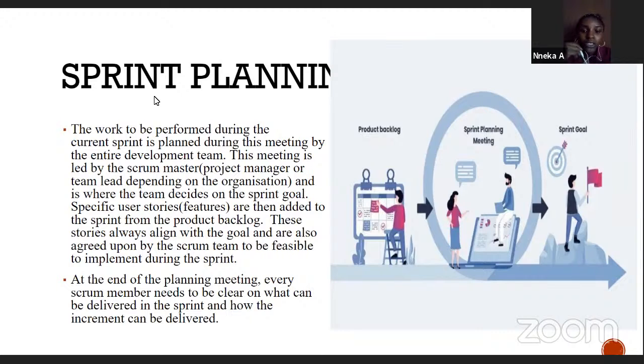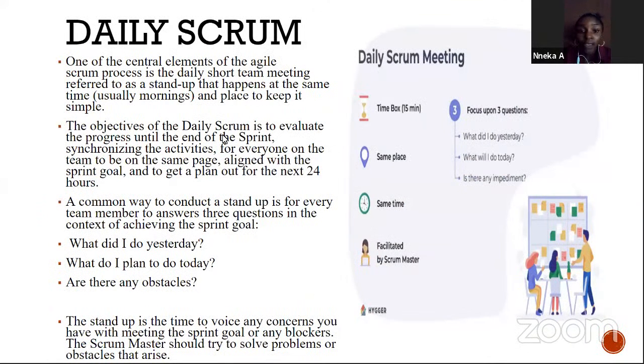Once the way we are going about this has been decided upon, it is put into the backlog in the form of user stories. I've talked about user stories in my previous presentation, but some people might not have been here. User stories are a way of explaining our features to the programmer. User stories take the format: as an X, I want to be able to do Y so that I can do Z. So in the LMS, I'll put my user story like this in the backlog, so the programmer, when he goes back, can understand what I'm talking about. For the push notification, I could say, as a participant of Bincom Academy, I want to be able to receive emails so that I would know when my assignments are due.